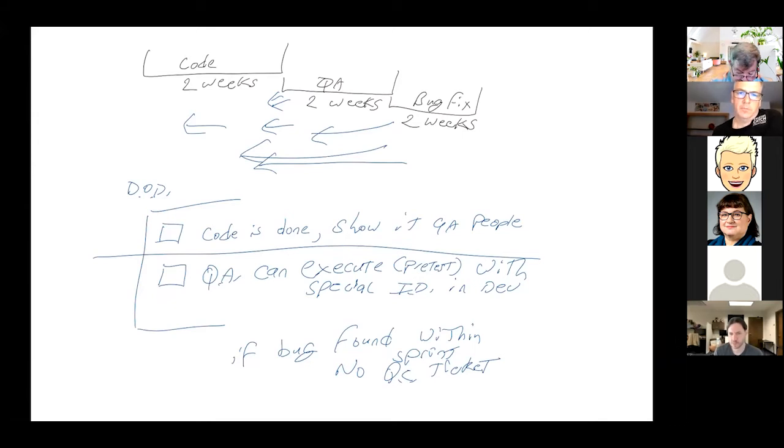Eventually, we got to the point where we also had automation by QA done. So QA people were starting to do some test automation before they actually got the code, which was great. That was about when I rolled off of that project. So how much further they got, I don't know, but they were heading down the tracks in the right direction. Point of the matter is, definition of done should not be static. You can use it as a way to improve your quality and get closer to completion, particularly if you inspect it at the retrospective.